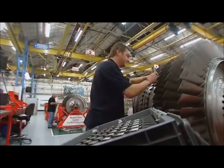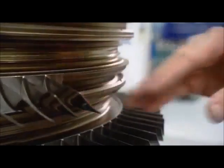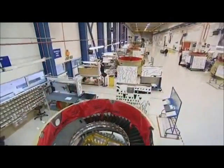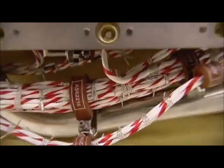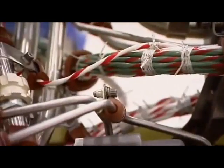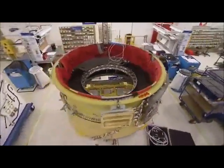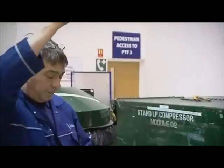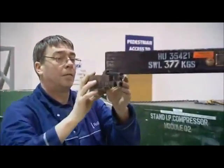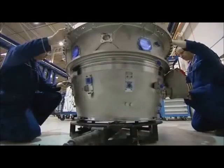The countdown starts with assembly of the biggest and most complex modules. Hundreds of precision-tooled blades, hand-fitted and finished to perfection. 4 days in, and work begins on the engine's Kevlar-wrapped aluminium fan case. Over 4,000 engine control and transmission parts, fitted and wired, every one by hand. At the same time, an army of expert fitters begin the 9-day task of fitting together the engine's 8 separate modules.